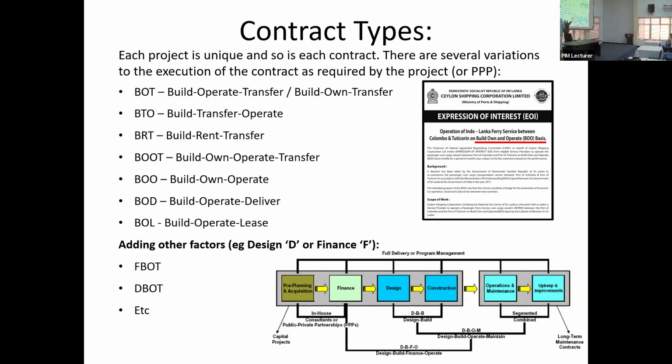So what they are saying is, okay, I understand you are a teacher, you have no money. Okay. Now, how much do you have? I have a little bit. Here, give it to me. Now, I will build it for you. For the next 15 years, 20 years, I will rent it and I will collect the balance money from the rental and cover the cost. After 15, 20 years, I will transfer it when I have covered my cost. So that is the latest thing. So build, rent. So at least after 20 years, when I am dead, the apartment will be there. Right? So that is another model that's being used. Build, rent, and then transfer.